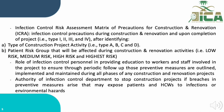The first step prior to any construction and renovation project is to perform an Infection Prevention and Control Risk Assessment (ICRA). The ICRA matrix consists of specific forms that must be filled and implemented before any construction or renovation activities. We must first identify the type of construction project activity — is it Type A, B, C, or D? — and also identify the patient risk group based on where the construction will take place.